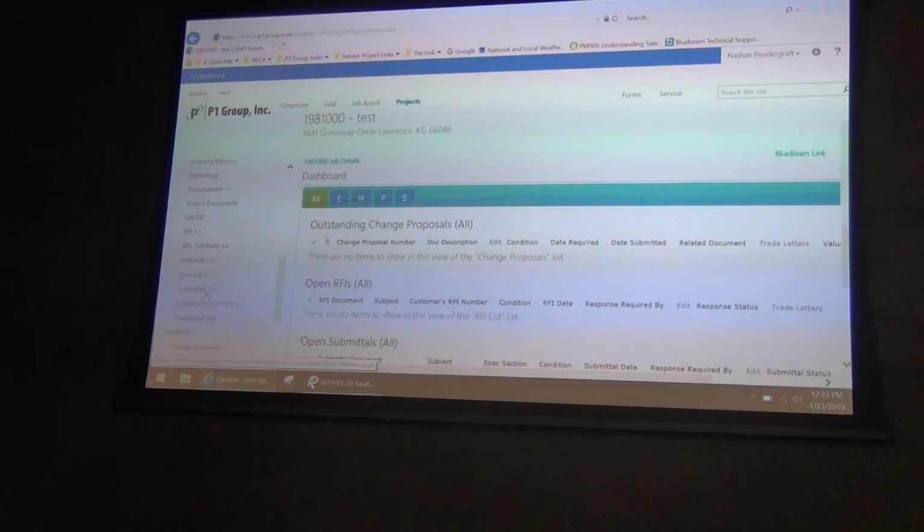And then part of our process, the people who update drawings, they get an alert when there's a response, and they go and they cloud the drawing and link it back to that document.